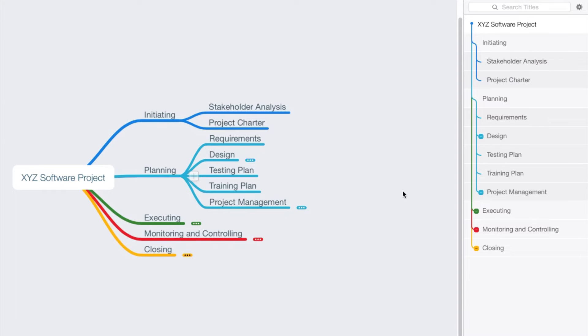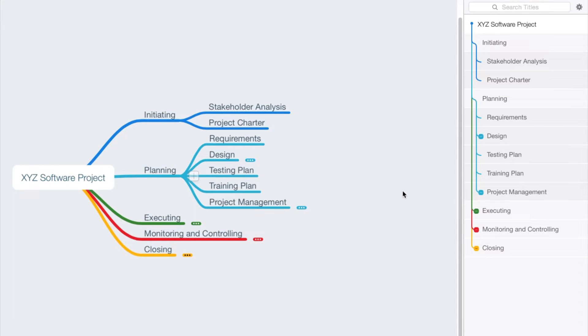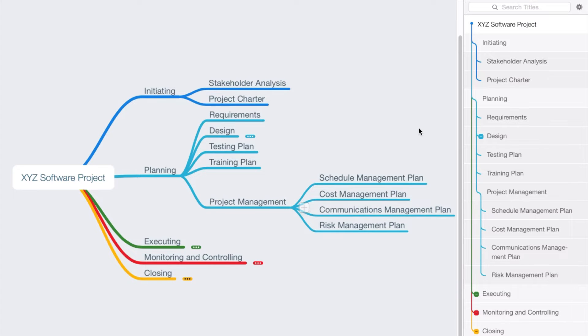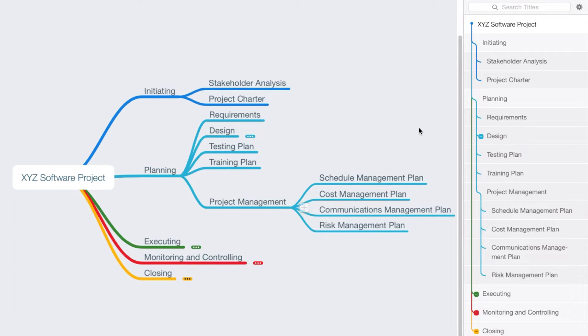And then in our planning process group, we might say here are some additional things that we want to deliver: we want a requirements document, we want a design document, we want a testing plan, a training plan. In the realm of project management, we might say we want to create the following plans: a schedule management plan, cost management plan, communications management plan, and risk management plan.